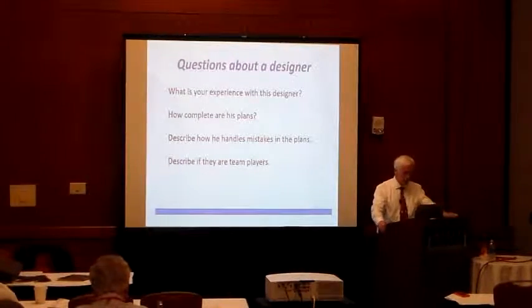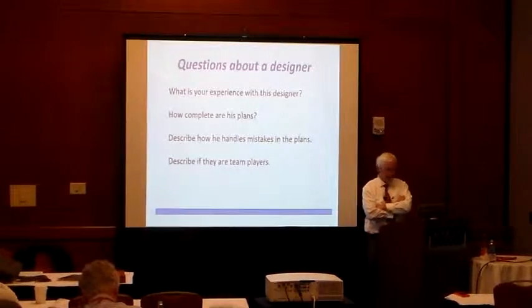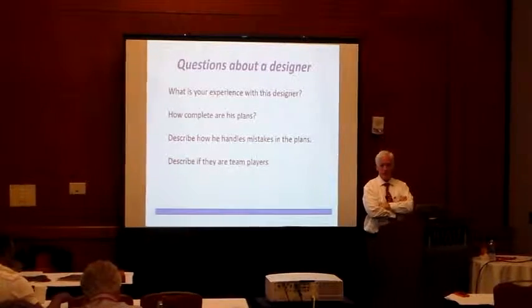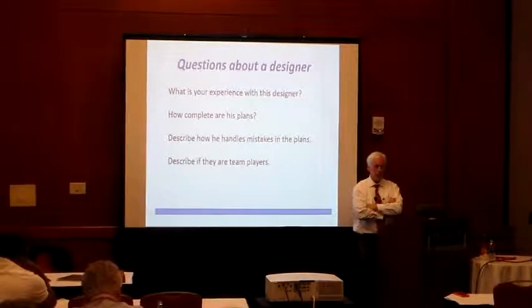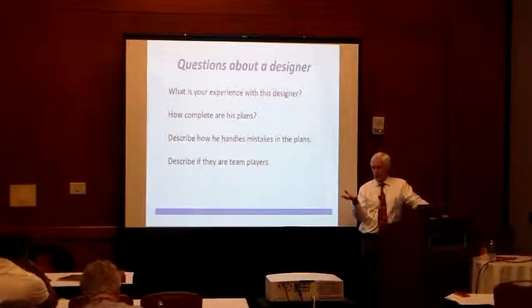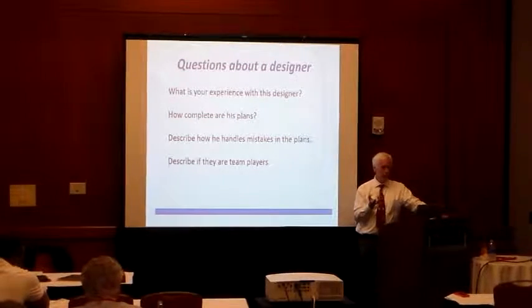So here are a few questions to ask specifically about a designer. Obviously, what's your experience? How complete is the drawing? Subcontractors will tell you how complete a set of plans are. And I can tell you, if the reputation of that designer is that his plans aren't complete, you're paying for it in increased fees.